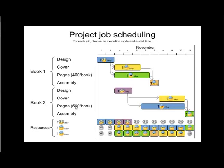You'd expect Book Two could be done in eight days — one day longer than Book One — and that is indeed the critical path. But the problem is our resources are limited. We have one designer and two workers available. As soon as Book One starts, the designer is unavailable for days one and two, so Book Two can only start on day three, giving us two days of delay right away.